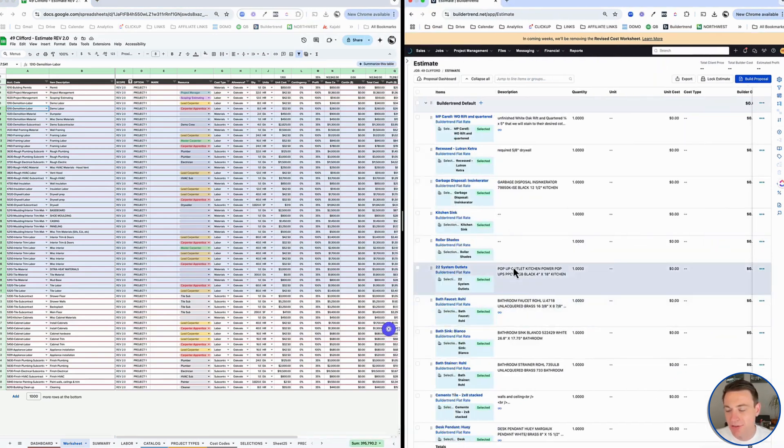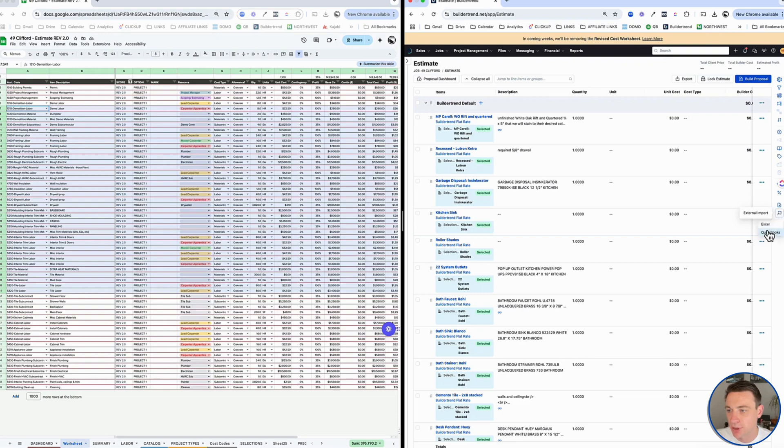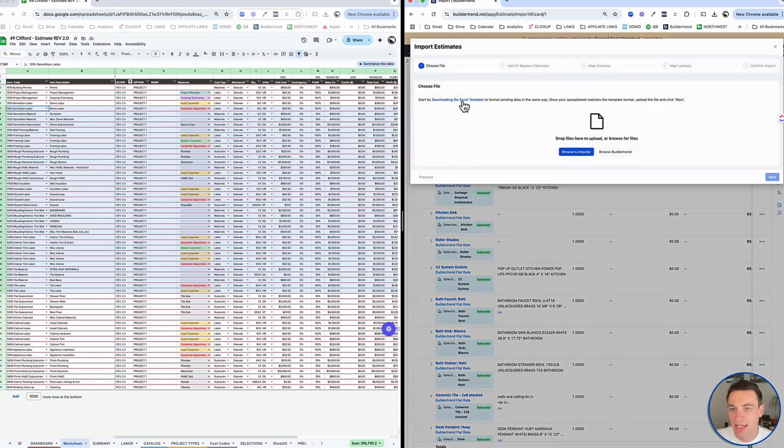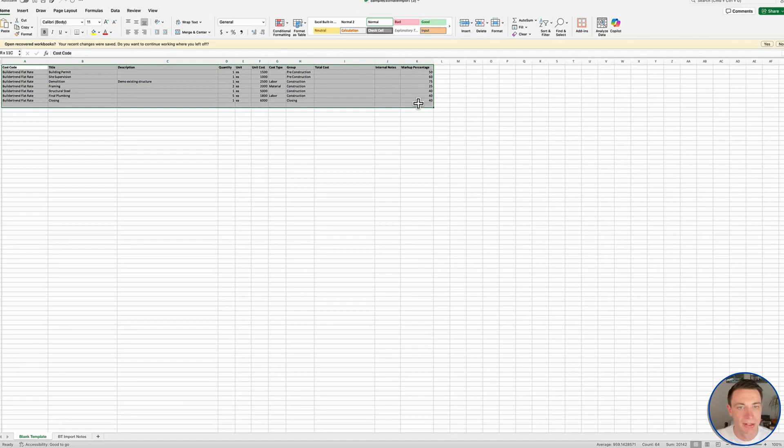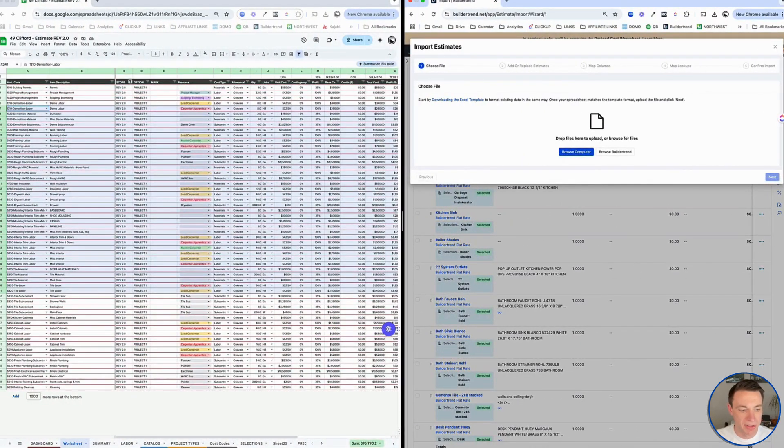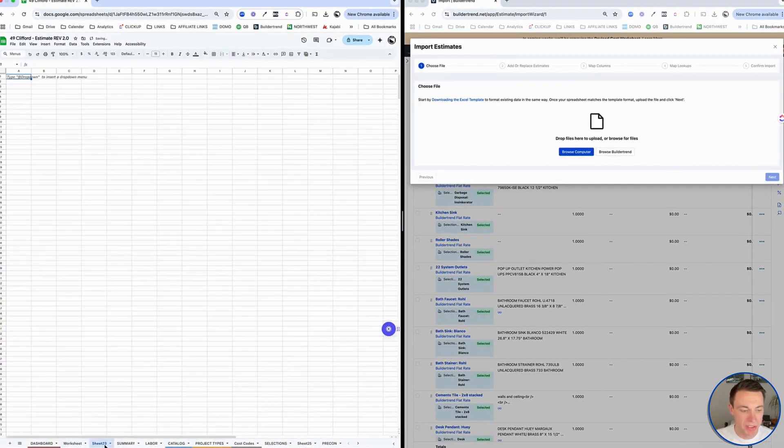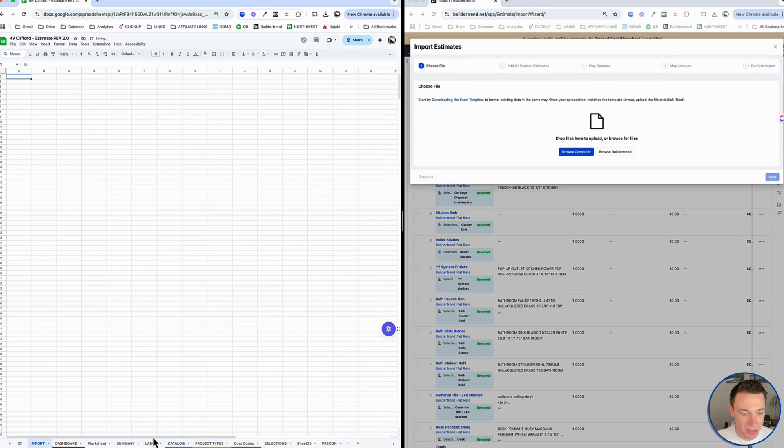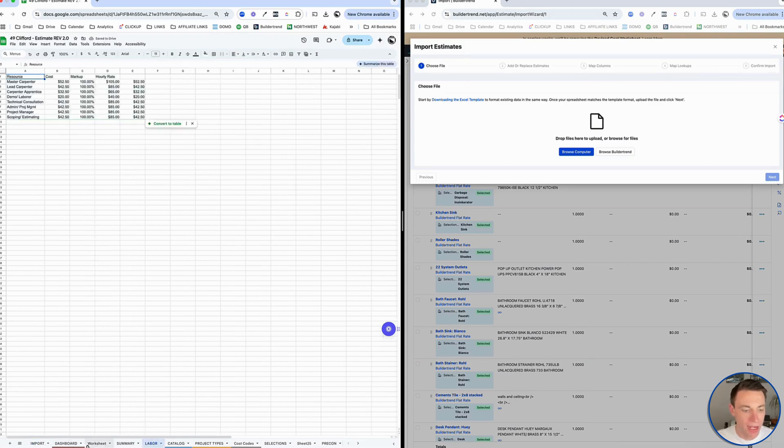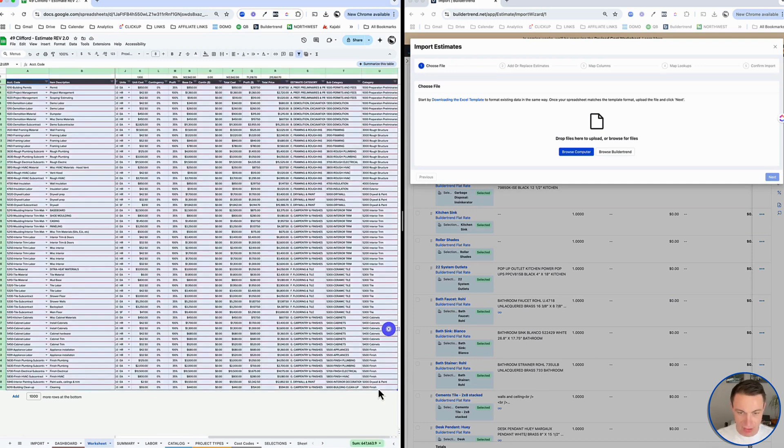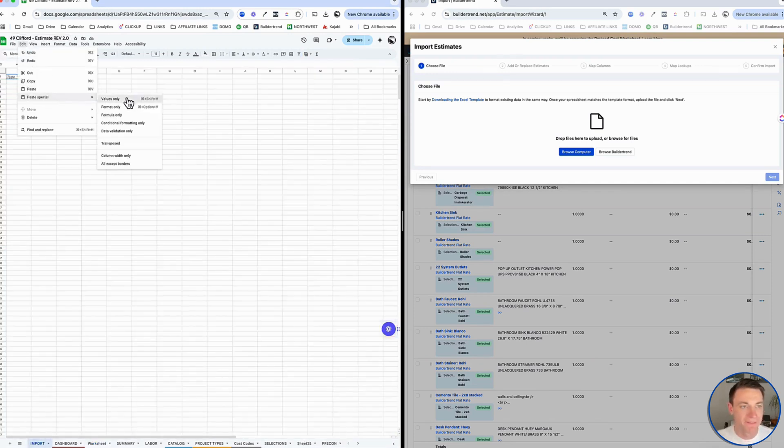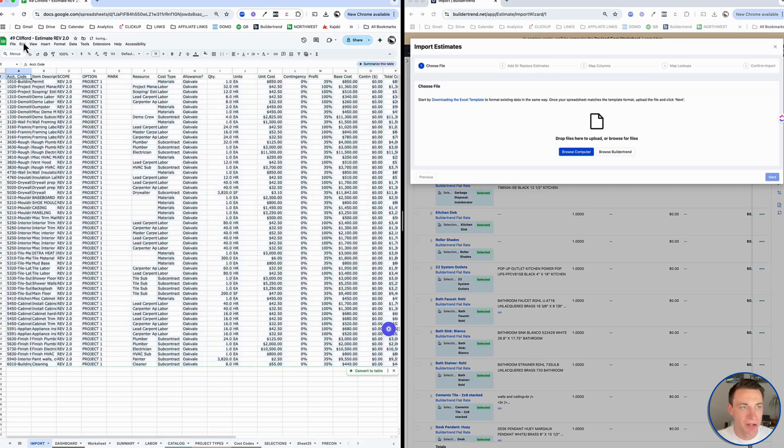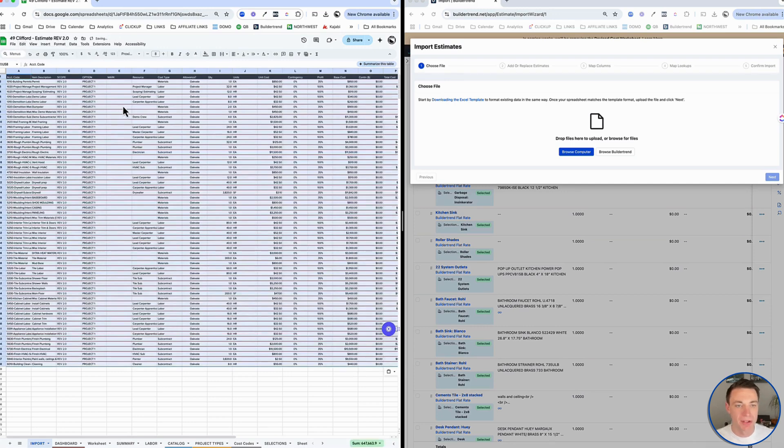I've zeroed out all my selections. My total price and cost are zero. Now I'm going to prepare for an import. First, I recommend you go to external import, go to Excel, and they've got this Excel template here which is really useful. This is a cool template that shows me the fields that they're looking for. I'm going to create a new tab. I work in Google Sheets, so I'm going to create this new sheet and call this import. The first thing I'm going to do is copy over my worksheet here. I'm going to grab the heading, all columns and rows. I'm going to do edit paste special values only to start, and then edit paste special format only. Doing values only takes away all the calculations, just gives me quantity, units, unit cost. That's really important because BuilderTrend is going to try to do its own math.